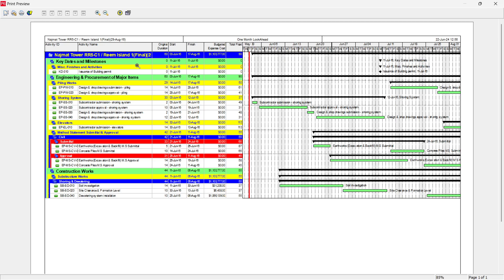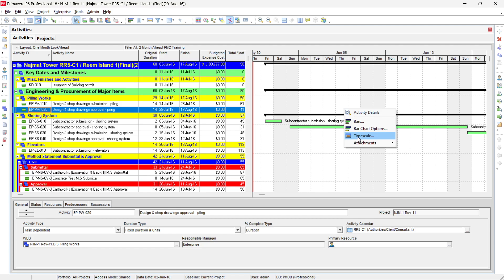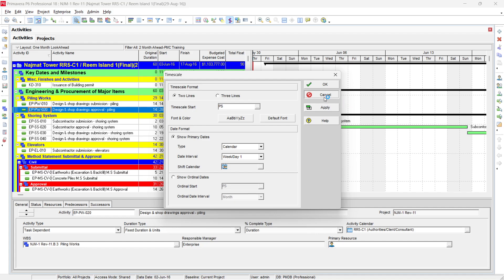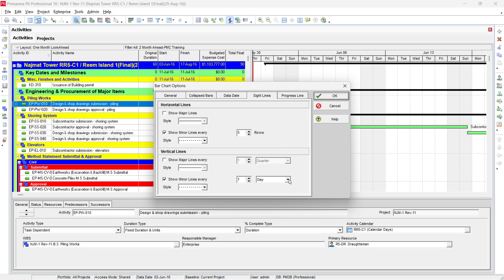Adjust the working days in your global calendar as appropriate. Since this is a baseline program that just started, you can see activities like site investigation and watering planned to start later, with some engineering works already started. For small durations of one, two, or three months you can show the Gantt chart on a daily basis, but for large projects measured in years it is not recommended. For those, show the calendar on a weekly or monthly basis. To switch to monthly, right-click, go to Bar Chart Options, then Sight Lines, and set major lines to month and minor lines to week.